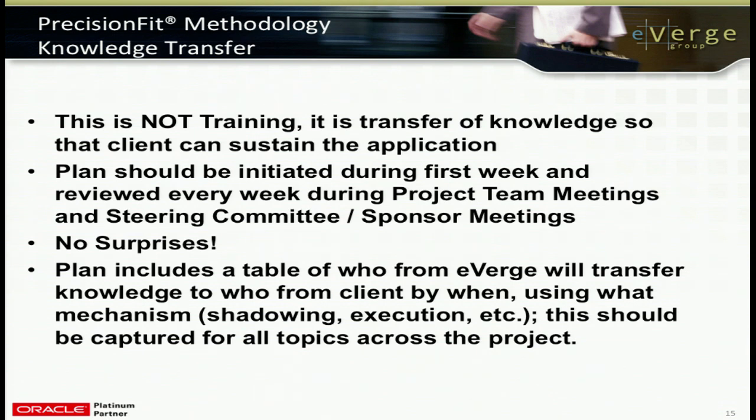When I say knowledge transfer, what I'm talking about is the actual transfer of knowledge as to what we have done during the implementation as a function of time. Now, what we really need to do and make part of our discipline with this methodology is, starting the very first week of the project, our project managers, solution architects, developers and business analysts should collaborate and develop what we call a knowledge transition template. And this template should be shown at the beginning of every status meeting during the week.